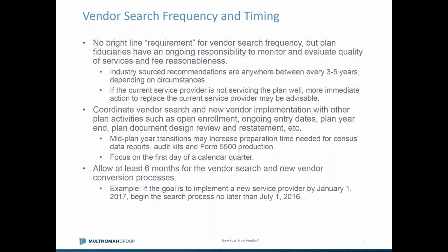So just understanding timing. A couple other things from kind of an external timing that we do see pop up. One is historically there's been a thought that we should make changes around planned year end, which for most plans is calendar year end. That's becoming less popular. The final few weeks of December and early January can be a difficult time to try and do communication with employees about changes. You also see more frequently that staffing levels kind of fall off as people take paid time off and are out of the office.